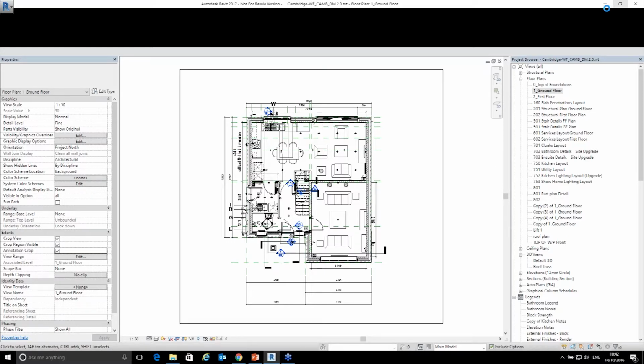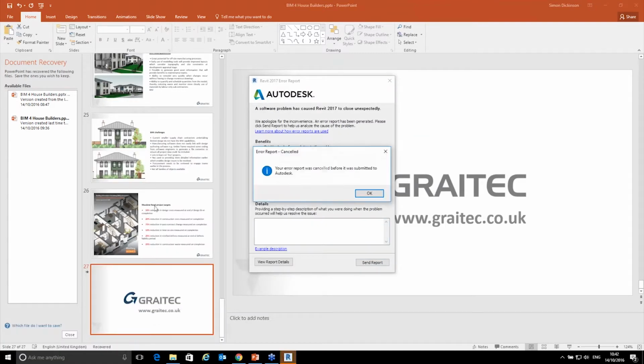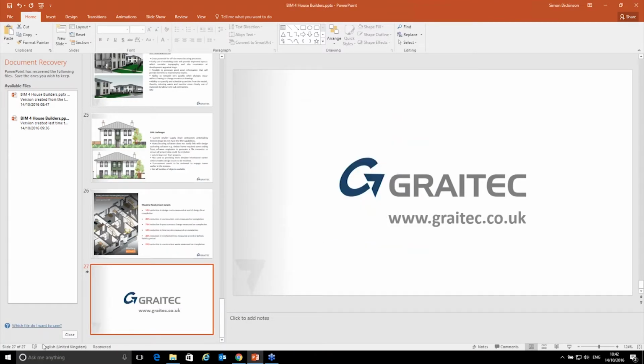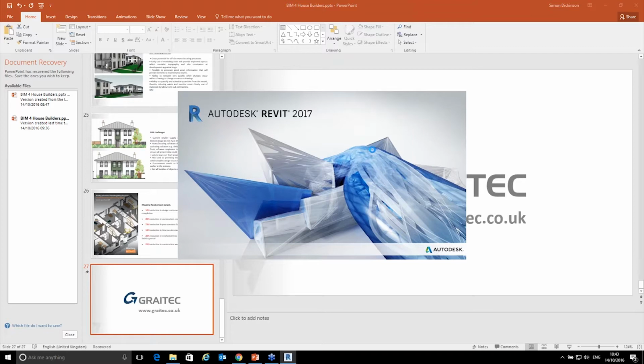So these were the targets that they actually achieved, yeah? And basically, a 10% reduction in design cost, measured at end of design and on completion, yeah, achieved. 20% reduction in construction costs, achieved. A 75% reduction in post-contract changes, yeah?